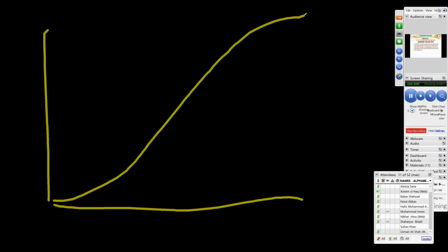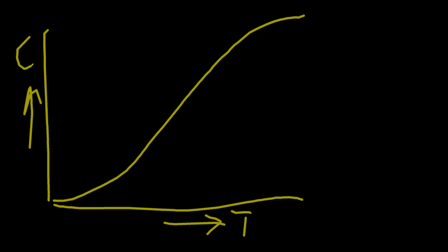Look at the difference, this is my S curve, and in this S curve this is my time running and this is my cost running, and this is the cumulative values of the budget throughout the life of the project. This is how it is going to turn out by this point. By this point, measure this distance. By this time I should have spent this much money on the work I am supposed to do. Meaning what? This is also called the budgeted cost of work scheduled.